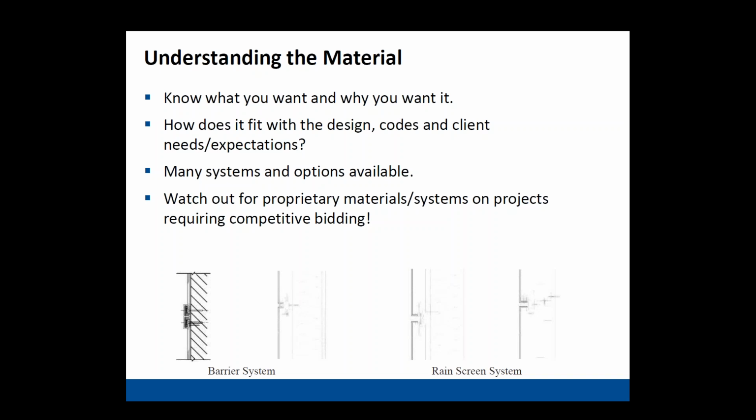And if you've got a client who needs to competitively bid and they're not willing to sole source, you're going to be in trouble, because the architect will invariably put some of these other contractors, fabricators, and some of the other sheet goods alongside this 8mm product, and then they'll get the other thing and it won't have the specialty finish, and again, there's discord and unhappiness, and that's what we're trying to avoid. Obviously, if the client wants it, loves it, has to have it, and is willing to sole source it, great. But you have to understand that going in, because after it's bid is a bad time to figure it out.